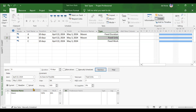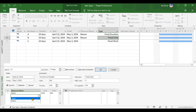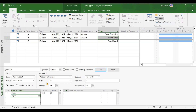Case 1 for fixed units: adding a helper resource. Duration can change and work can also vary. MSP has a tendency to touch duration first — if it has freedom to change duration as well as work, it will hamper duration first. After assigning helper, units become 2. Checking the formula: work is 160 hours, duration is 80 hours, so 160 ÷ 80 = 2, confirming no unexpected change. MSP itself did not increase units — we added the helper resource ourselves.